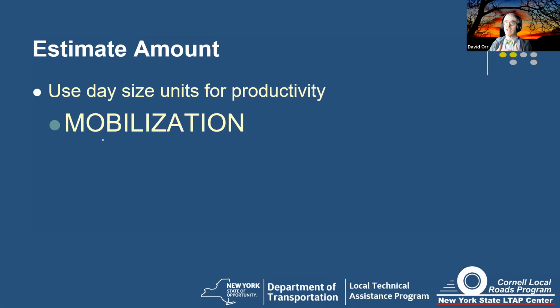By using a day size unit, mobilization gets built in. Now, contractors love to calculate the mobilization cost because it matters to them because they may be driving 3 or 4 hours from their main facility.